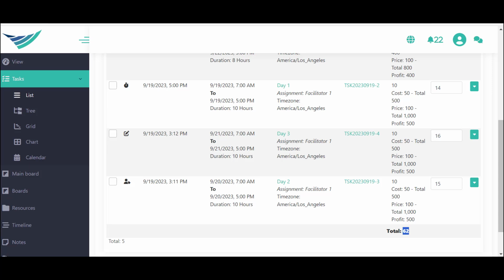So let's look at your emphasis and requests. Is there inheritability for project manager type of resource request? So we went through the process of resource requesting. Somebody can build out the work breakdown structure, and then the PM can go and decide which resource is going to get a request. So your resource is going to get email or text with a link where they can confirm or deny their participation in the project.